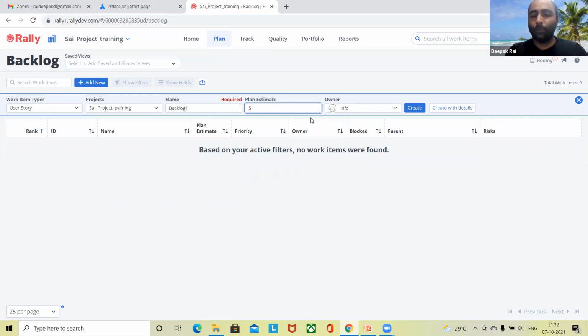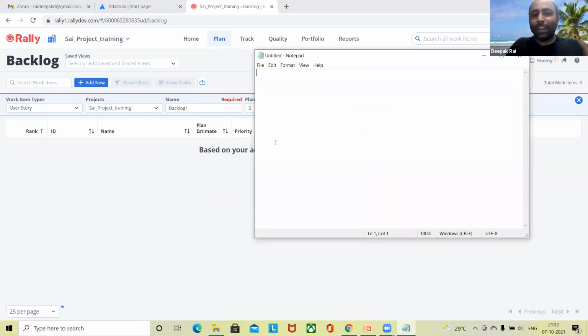So for 45 hours, I'm not saying you can enter 45 hours directly; divide it by your working hours. Let's say for actual working hours, if you have 8 hours of work in your office, none of the employees work a complete 8 hours. Maybe they spend 15 minutes in meetings, half an hour for lunch, and again 15 minutes for some breaks. So you are losing 1 hour out of 8 hours, and you have only 7 hours.